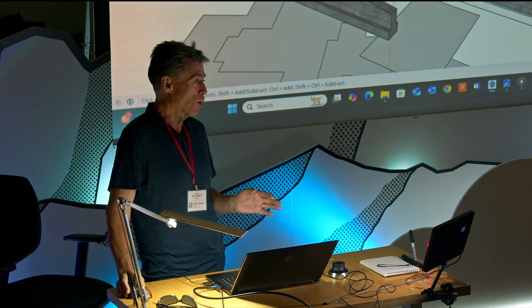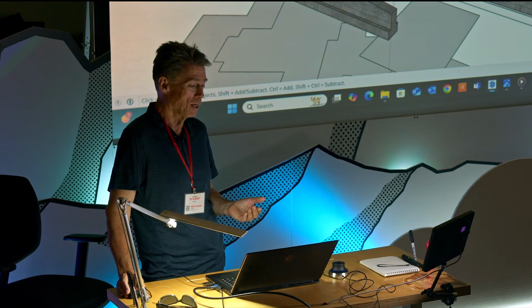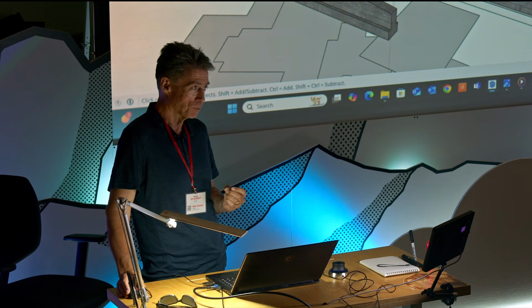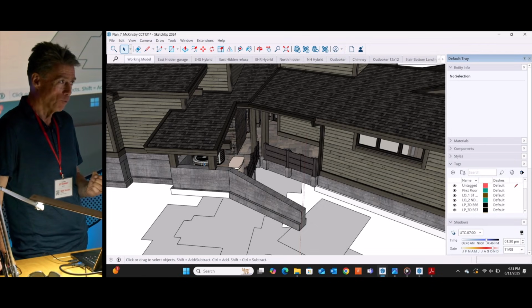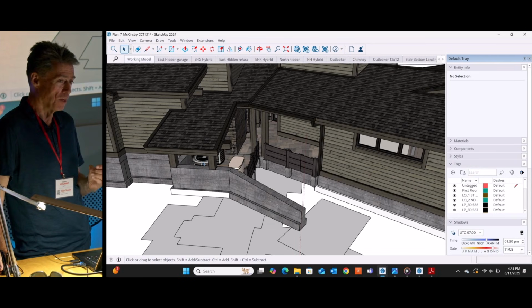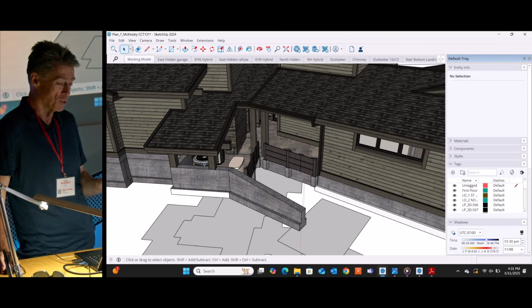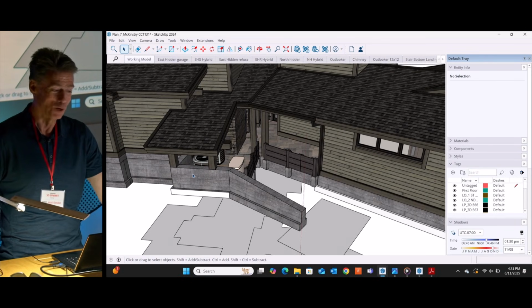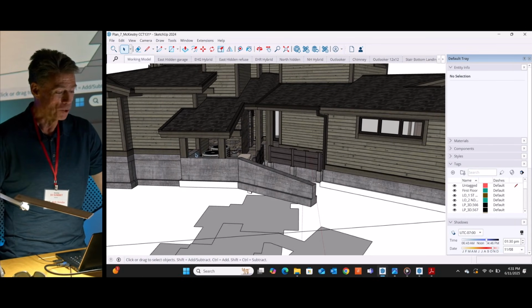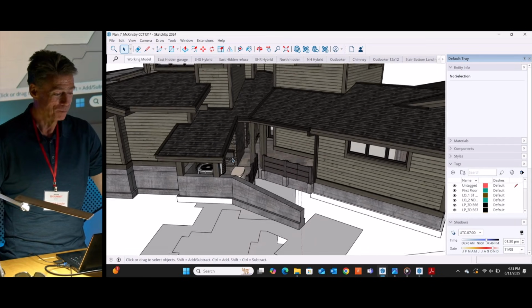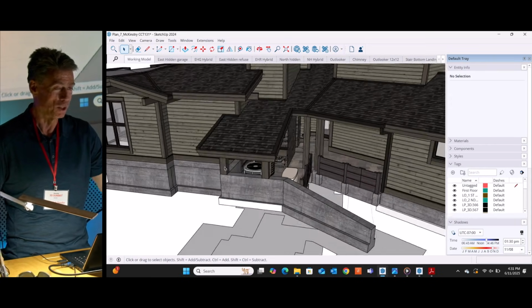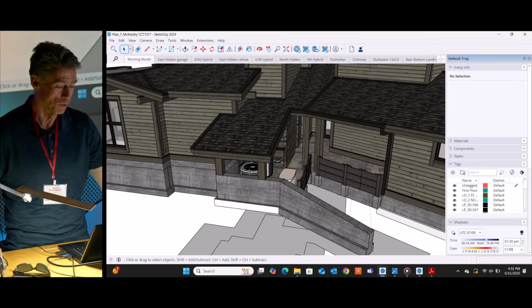But the development requires us to screen all the equipment so you can't see it. So all of these walls have to match the height. And this was classic when we spec'd the original condensers. They were 48 inches tall, and then the new model was purchased on site, and it's 54 inches tall. So our walls, we haven't heard from the HOA yet if they're going to require the fix. The fix will be to put some railing there. This house doesn't have any second floor railing, so we can't match it, but it'd be like a steel tube rail or something to give it a little screening.